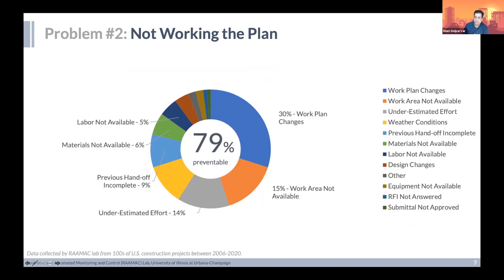The second issue is that many companies have become good at putting together milestones and long-term plans, but when it comes to understanding how we can execute tasks every day and every week, there's a lot of room for improvement. I've been capturing data for many projects, and the analysis shows there are many reasons that short-term plans — our weekly work plans and look-ahead schedules — are not achieving the goals we desire: plans change, work areas are not available, underestimated effort, and so on. But if you look closely, almost 80% of them are preventable.